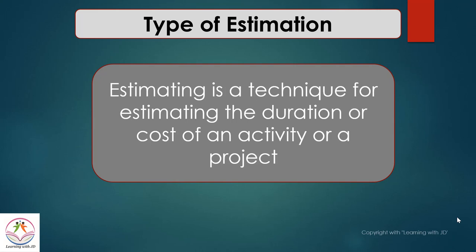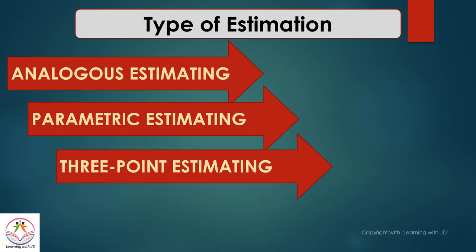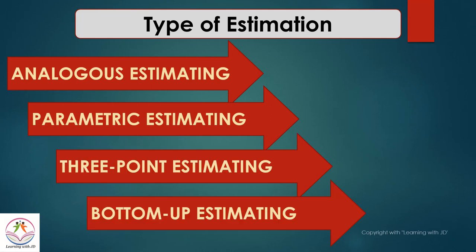Welcome back to Learning with JD. In today's session we are going to talk about the types of estimation. Estimating is a technique for estimating the duration or the cost of an activity or a project. When you are in your planning stage, there are various tools and techniques used for estimating. There are four kinds of estimation techniques: analogous estimation, parametric, three-point estimation, and bottom-up estimation.